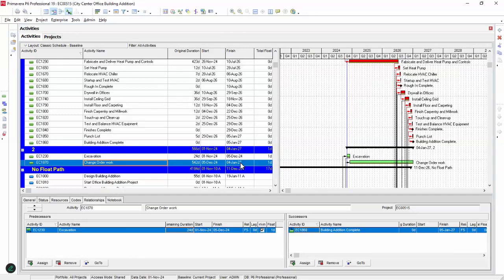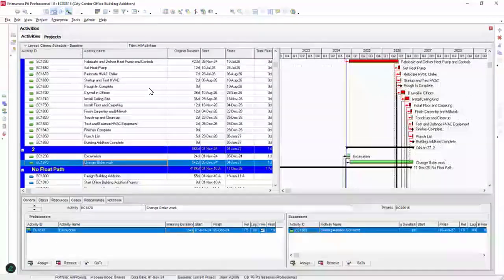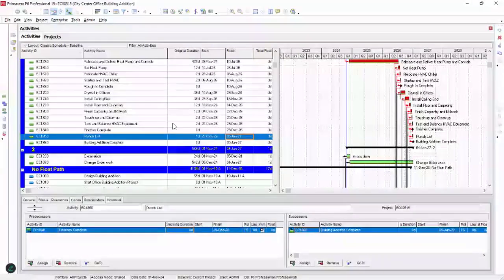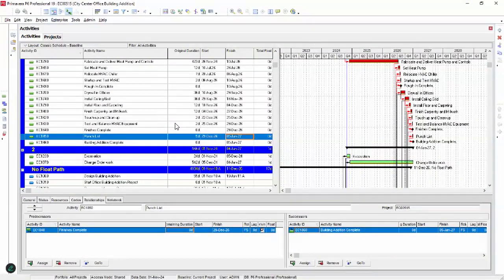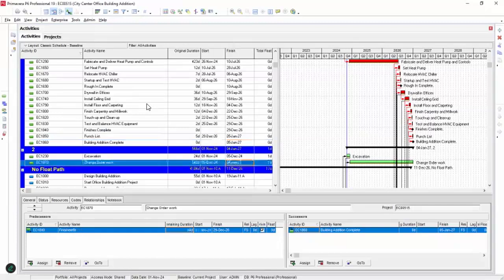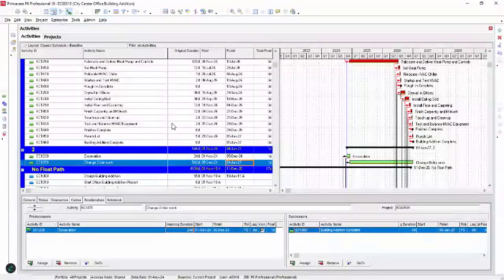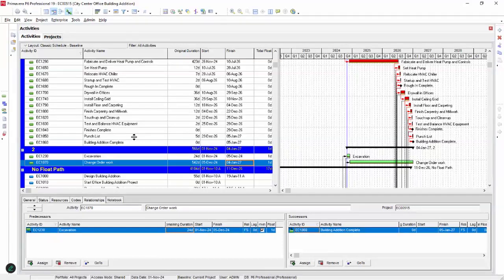And that's why it was not as critical as those activities that we had. Essentially the last activity in that set of activities actually was ending on January 5. But on the secondary path, the end activity finishes on January 4. And that's why this set is identified to be there.